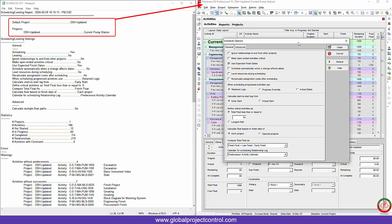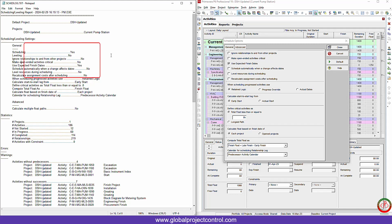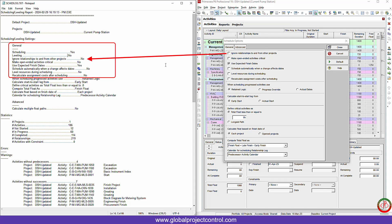First of all, on the top area we have the name of the project and the ID of the project. After that, as you see on the screen, we have the general information on the schedule log. The first option is scheduling leveling setting. On the schedule leveling setting, we discuss about what kind of setting we use during this scheduling. Whatever you have on the schedule option, you can find it on this notepad file. For instance, scheduling yes, leveling no. It means that I didn't level the project, I only scheduled the project.